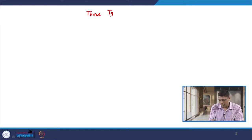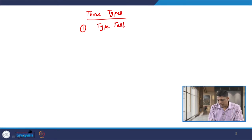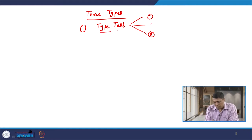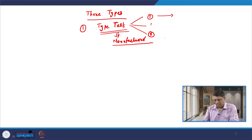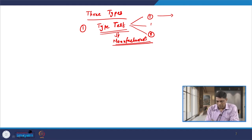Let us continue our discussion on the testing, commissioning and maintenance of relays. There are basically three types of tests to be carried out on the relay. The first type is known as the type test — there are different types of type tests numbered 1 to 8, and all these type tests are to be performed by the manufacturer at their own premises.